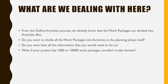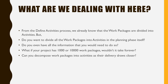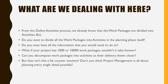If your project is a mega project and you have 10,000 work packages, do you want to divide every single one of those into activities in the planning phase itself? When are you going to start execution? Can you decompose work packages into activities as their delivery draws closer? Can you wait for the delivery date of a work package — say the delivery date is three weeks or a month from now — and then start decomposing it into activities, rather than doing that upfront in the planning phase?